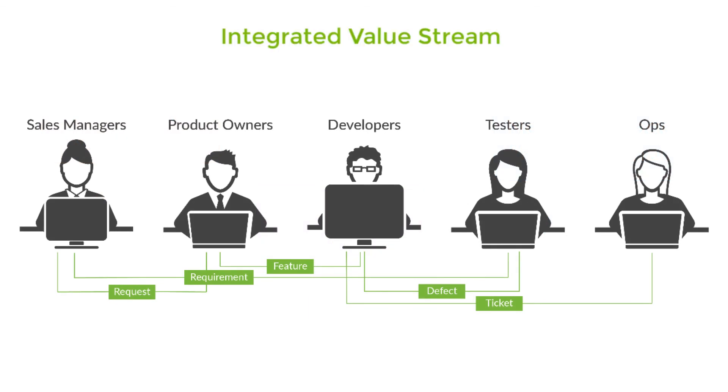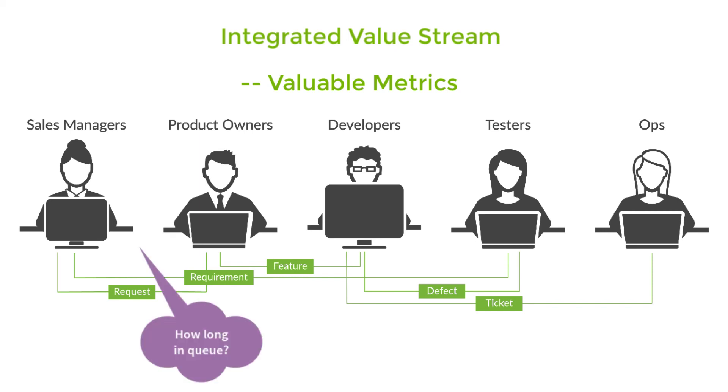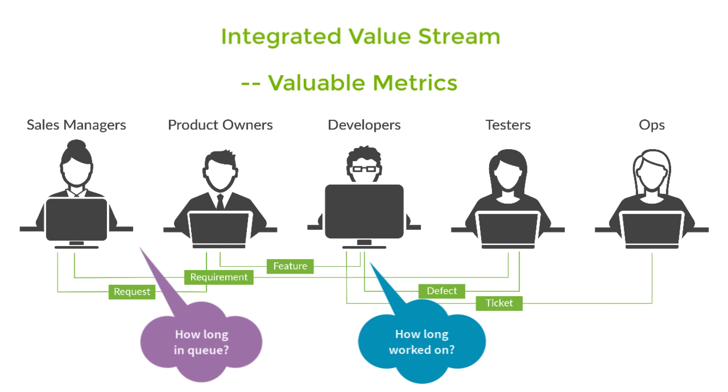Once you have a fully linked and traceable process for handling features and requests using Tasktop, you can actually create some extremely useful metrics around software delivery. Not only how long does it take to implement a feature, but why? How long did the feature wait in a queue at each stage? How long was it actually worked on? If you have the data and can measure these things, you can also figure out ways to improve.